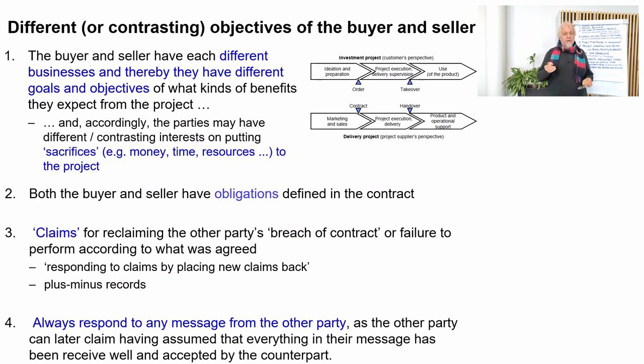So the fourth item here is, I think, rather important to understand: always reply to any message from the other party. So send a response. The content of your reply can be many things. It can be that you don't say almost anything, but it's important that you are replying. For example, you can say that, okay, I have received your message. I will come back to you in 2 weeks' time when we find out how I should answer you.